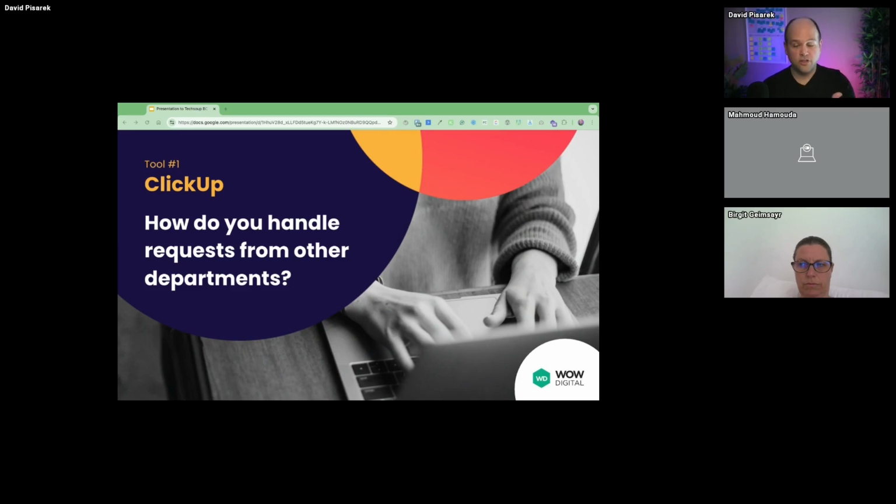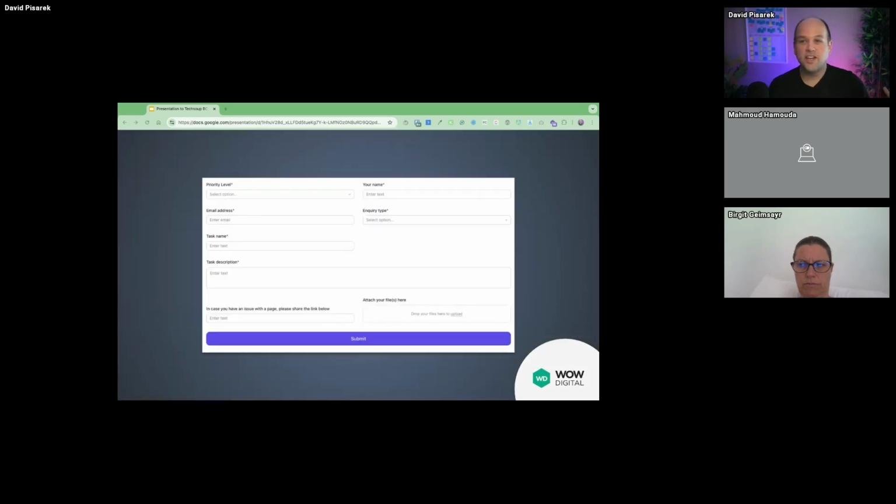Yeah, so I'm going to show you, actually I did not share my slide deck with Eli, but every couple of slides, the segue is perfect. I'm going to show you the form that we use with our clients. Happens to be the next slide. Perfect. So we ask our clients, so think of your departments, think of you going and filling this out also so that you can create tasks. What is the priority of this? We have regular, which is 5 to 10 days. We have rush, which is, I think, 3 to 4 days. Urgent, which is 2 business days. And high priority is 2 to 4 hours, right?